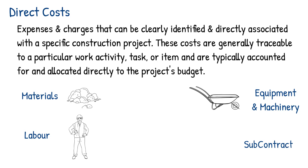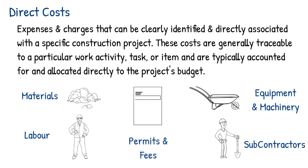Subcontractor costs: payments made to subcontractors hired to perform specific tasks or portions of the project, such as electrical work or plumbing. Permits and fees: expenses related to obtaining permits, licences, inspections and other regulatory requirements specific to that project.